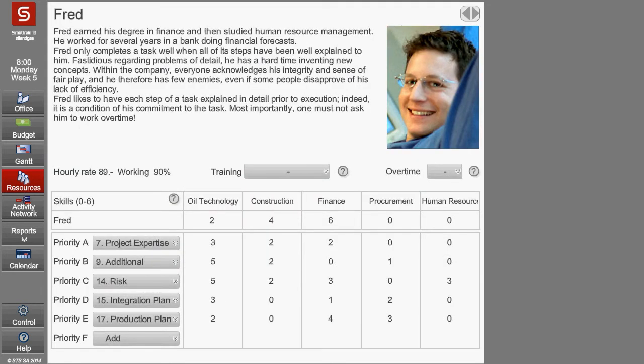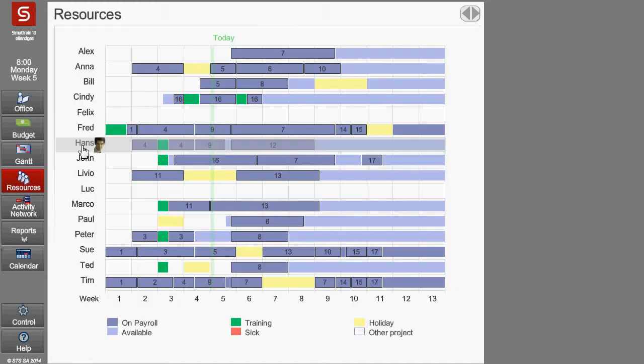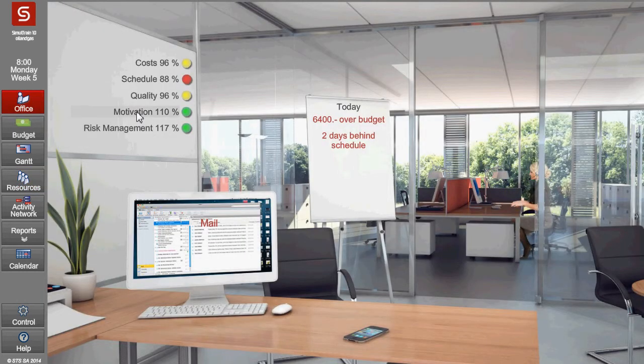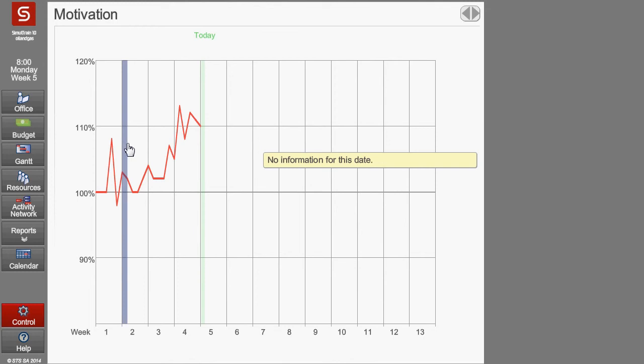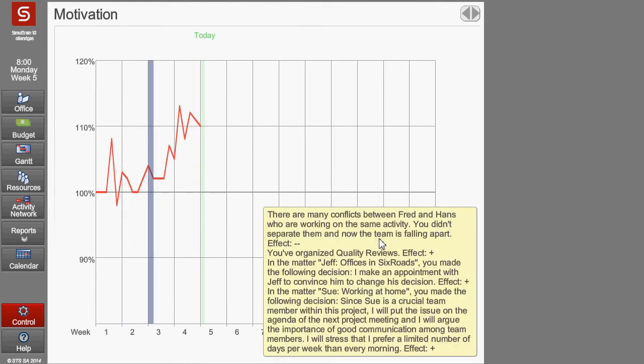Like in real life, there are conflicts among the team members, and the project manager needs to find a solution. For example, Fred hates to work with gangs on the same activity. I made an error — I put these guys together on the same activity and he complains by mail. If the project manager does not separate these guys in a couple of days, motivation in week 3 drops down because of the conflict.